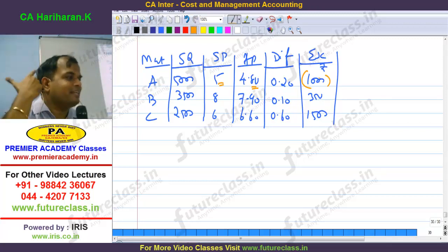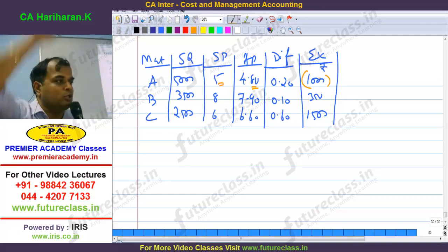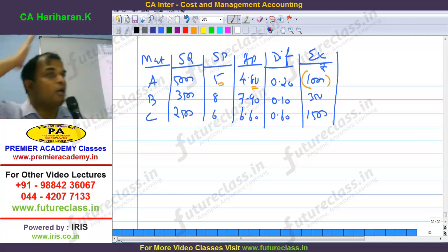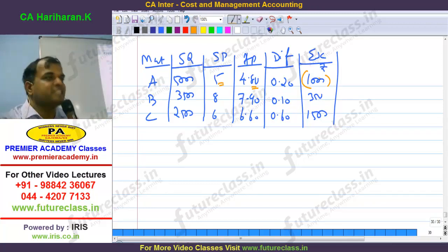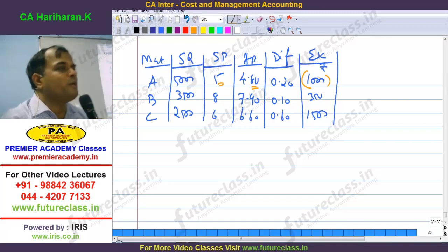Understood? Because I have bought more. But escalation not only for increase, there is escalator and there is also decrease. Many people wrongly know escalation only for incremental. Escalation for increase or decrease changes. Escalator goes down, it will decrease a lot. So, if there is increase, you have to pay. If there is decrease, you have to enjoy the benefit because you are the house property owner.